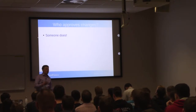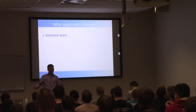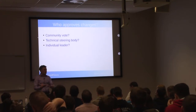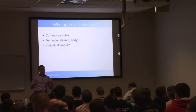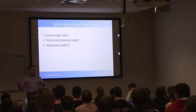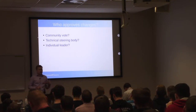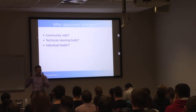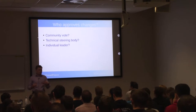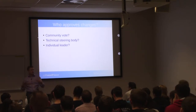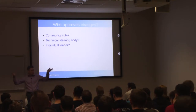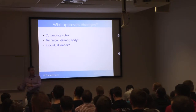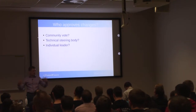So who approves the changes — who has the vote? Somebody does. Do you put it to a community vote, where everyone who is a contributor gives a plus-one or minus-one and you tally it up? Do you have a technical steering body — a smaller group of people that evaluates technical changes and makes the decision? Or do you have an individual leader? In the kernel, for example, Linus is the ultimate authority, and he's delegated to people in different subsystems — within each smaller part, a person owns it and makes the decision.